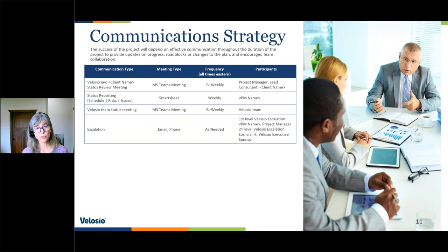Your project manager will also give you a weekly status report. And so that weekly status report will again recap, where are we on the project? Is the project green, red, or yellow, depending on the stage, and list out the high issues. So that's posted, that's sent to you, that's posted on the SharePoint site. So at any point, anybody who wasn't able to attend the status meeting could pull down that report and take a look at it and see how the project's health was.